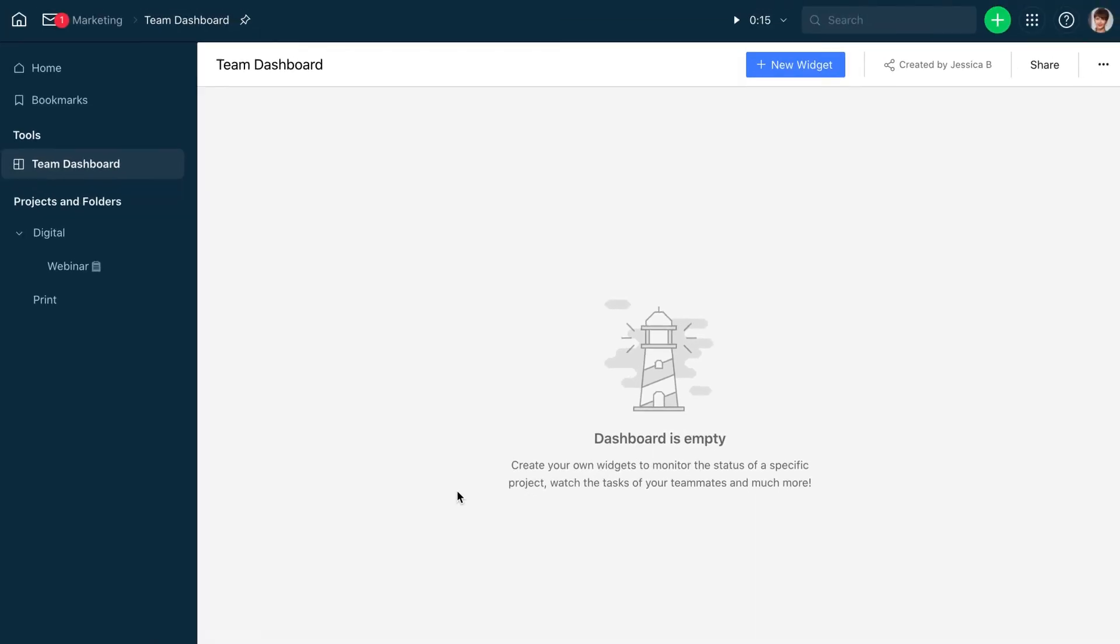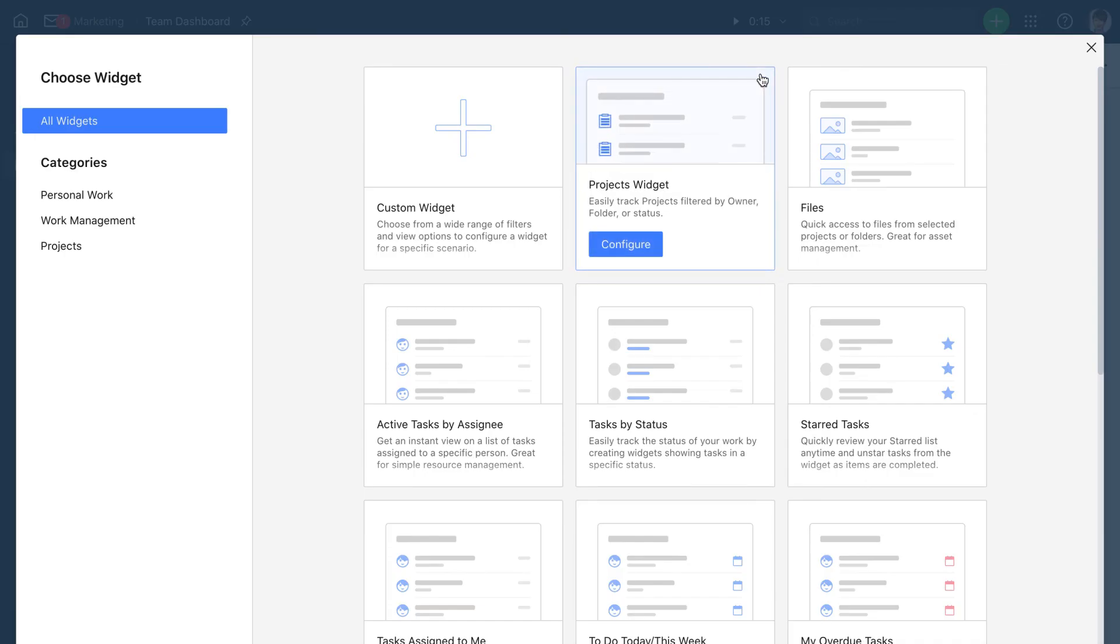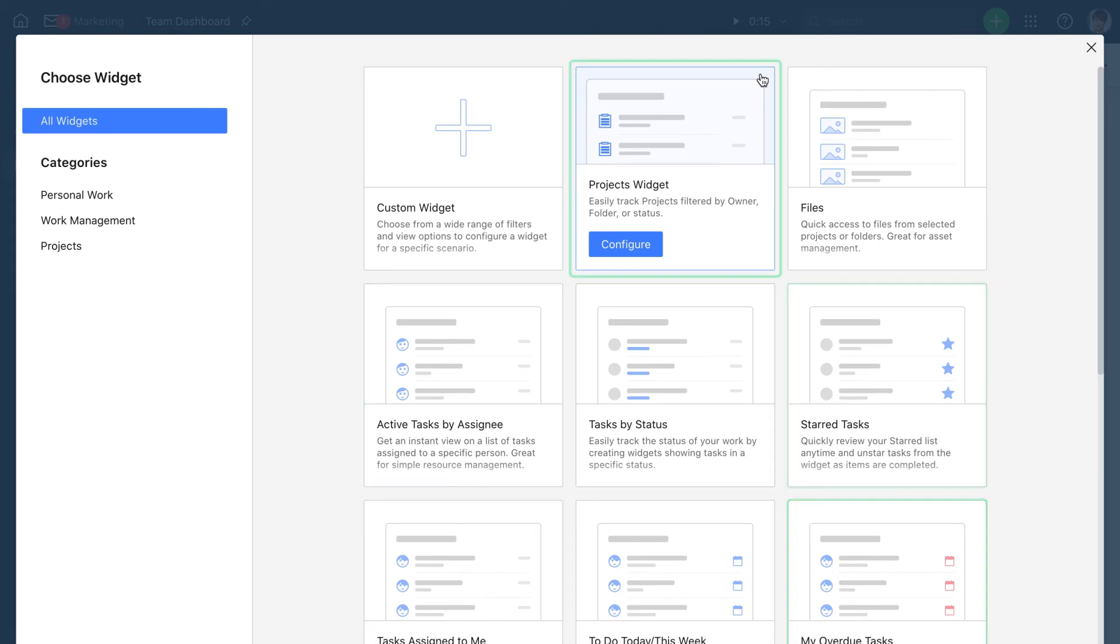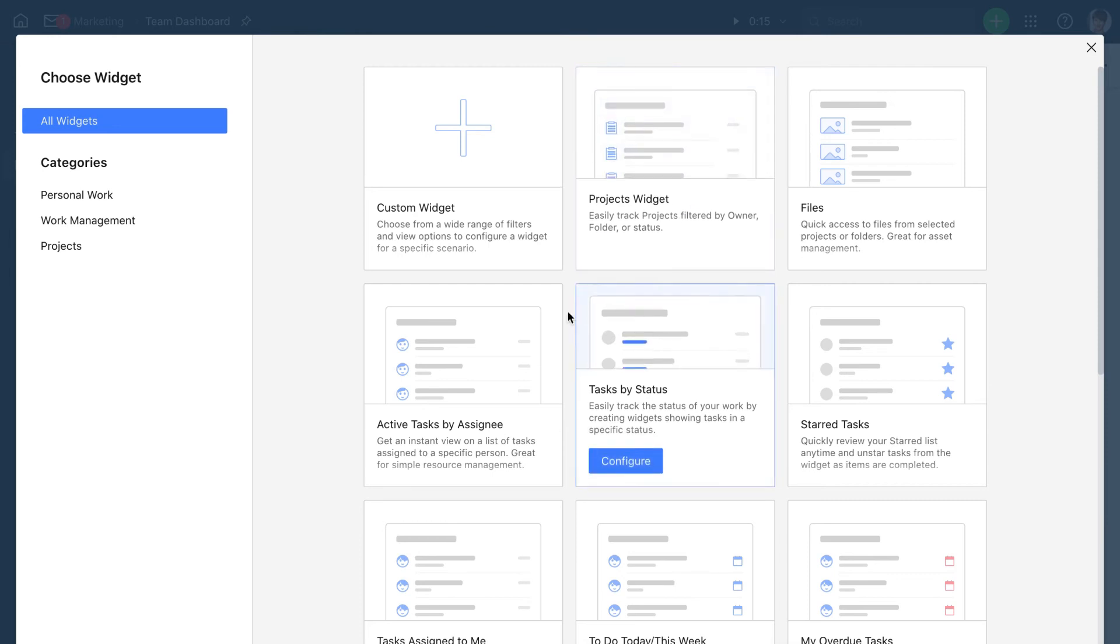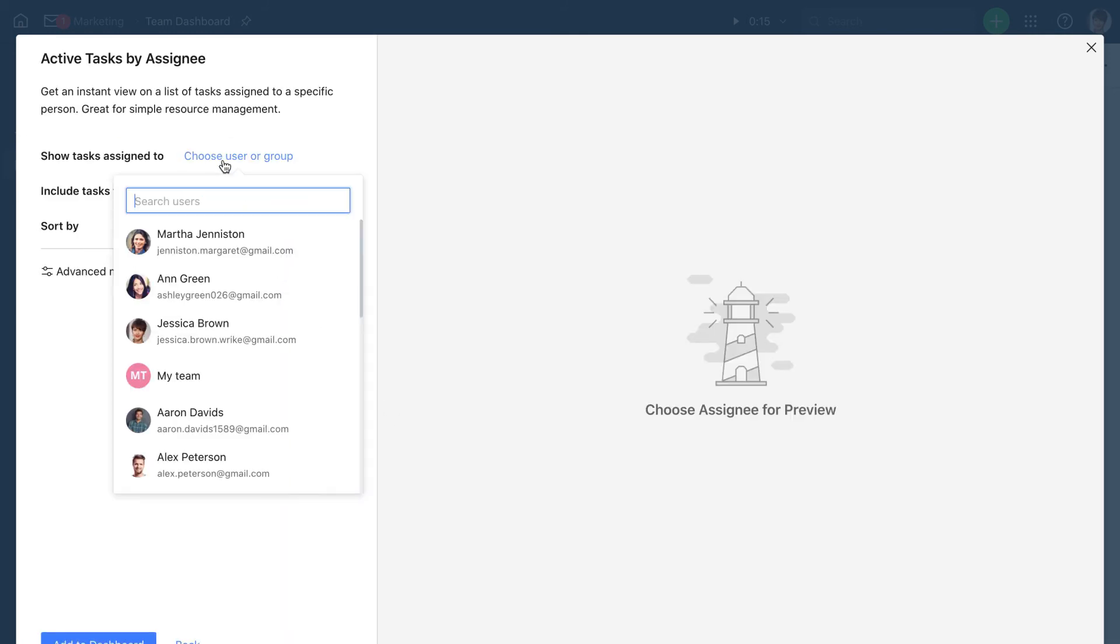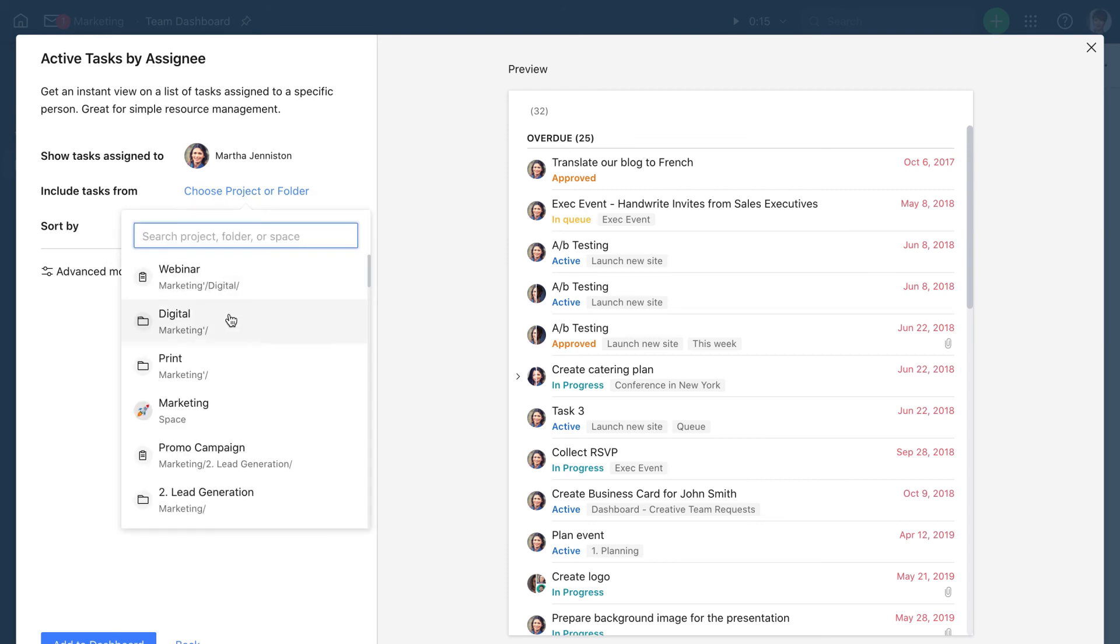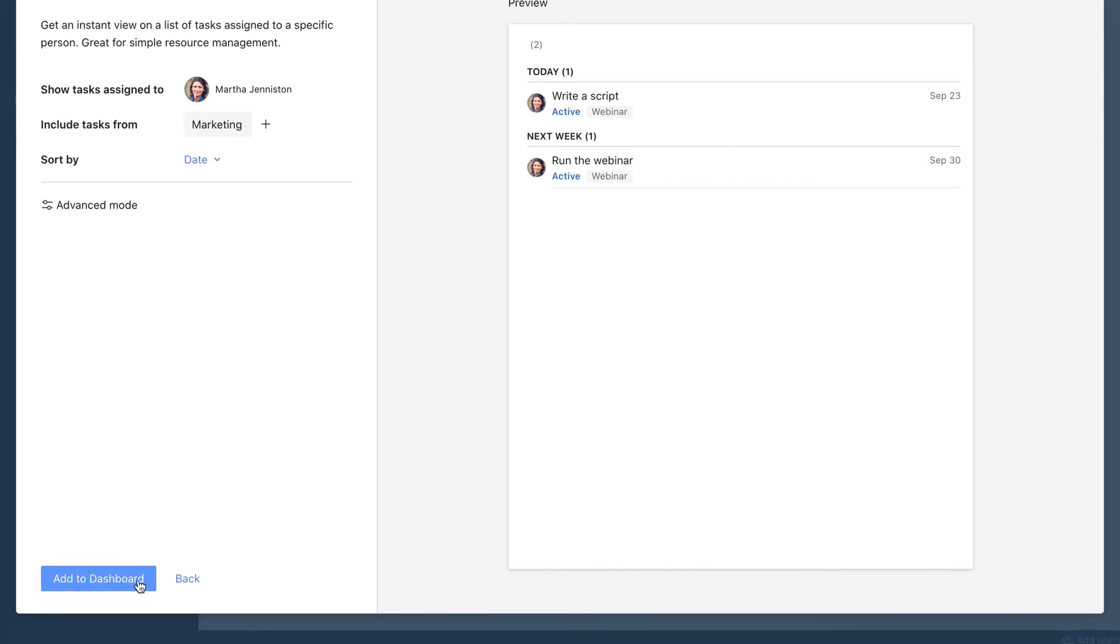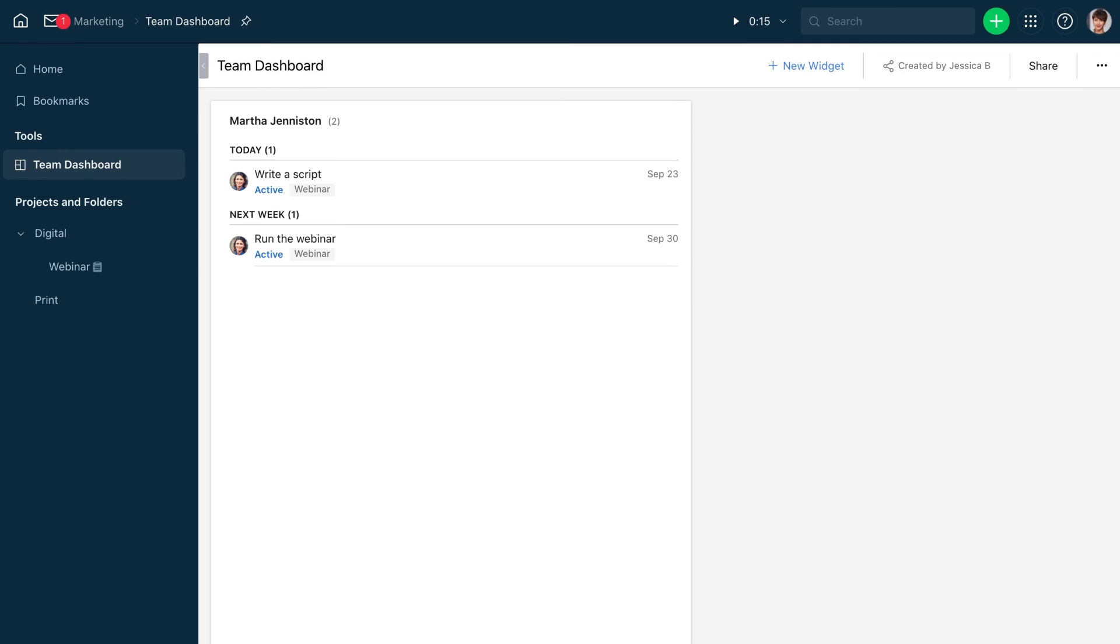Now let's fill the dashboard with widgets. A widget shows a list of tasks, projects, or files based on the criteria you specify. For this dashboard, we'll create a widget with the lists of tasks assigned to each team member. We can use this pre-built template. Select a team member from the list and choose the space. Let's repeat that for the rest of the team.